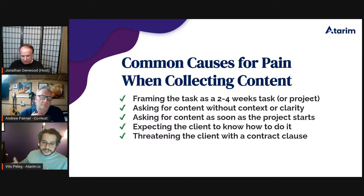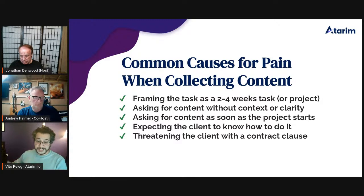But more than that, if we're looking at this first point, who really has 4 weeks to clear out our table, as business owners, and do one thing? I never have any task on my calendar that is a 4 weeks task. It's always broken down to smaller bits and pieces, so I can actually put it inside my calendar. If we're really thinking about it, when we come to build a basic business website, it's not a 4 weeks task. We just say that it is because we got burned so many times before. So we're giving them more time to execute on something that they don't know how to execute on. So instead, if the question is what happens if they semi-disappear mid-project, fixing it before this happens is a lot easier, by setting up short time spans.